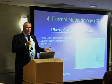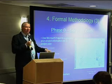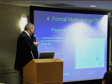And for every day that takes longer to do, the entire thing gets pushed down a day, such as obtain an orchestra. We're going back to this opera paradigm. If you don't have an orchestra and you need to start rehearsals, your rehearsals cannot start until that orchestra thing gets resolved. So getting an orchestra is on the critical path to your entire project.